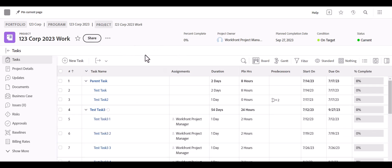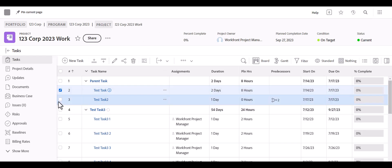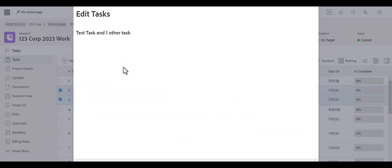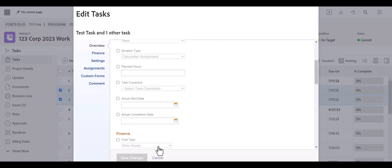Those are some easy tips and tricks for quickly adding tasks, organizing them, and editing. You can also edit in bulk at any point by selecting tasks from the project list view and using the pencil icon to edit and add details when they're all the same. Thank you so much for watching.